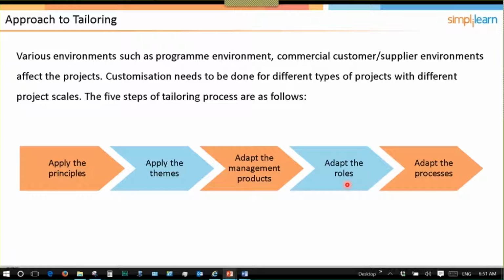I also have to have a project manager. That's not something we typically want to see shared. You have to have the role of a support person. However, the project manager may assume that role, and that's really all you need, okay? So you're going to have a quality assurance function that's going to happen outside of the project, but that's external to the project. You would need a project assurance role, which by default is the responsibility of the board. But if they delegate it, then you might have a separate person doing that. But again, if the board can handle it on their own, then I don't have a separate person doing it. Okay, does that help, Christopher?